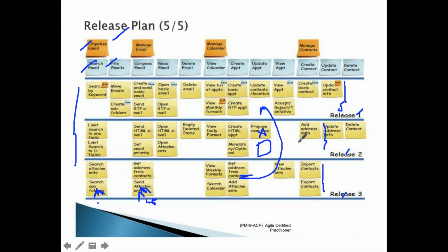For example, you wanted to give the payment gateway a later time, because even without a payment gateway you can do the e-commerce business. Cash on delivery, COD, right? Customers will buy and they will pay in cash, right? That is the reason you kept the payment gateway in release 3, right? But suddenly demonetization has come. Then there is no cash available. Then the payment gateway will go to release 1. Prioritization has changed. So that's how they do it. Did I answer your question? Yes, sir. Thank you.